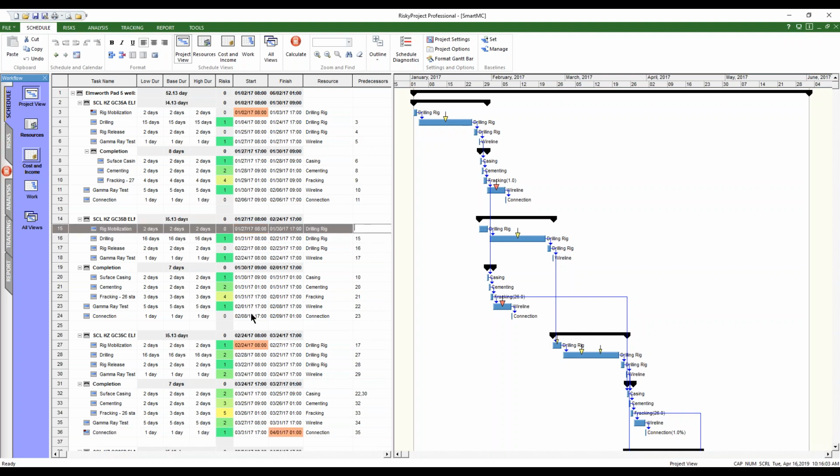This should be on our precedent network, but it actually doesn't have a link. What's happened here is we've modeled a situation where a scheduler has put a must start on here to pin the start date for this new series of activities that will drive off of that. So they've put a must start date on when really it should be coming off of here.